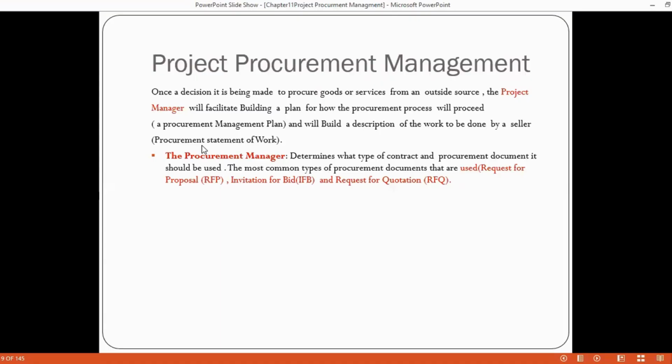The statement of work will be provided from the client side, saying what items he needs to purchase and what he needs us to do for him, and whether to customize an application for him, or he needs to directly purchase a ready-made product from our side. So there will be a plan of whether we're going to customize or take a ready-made application, which will require performing a gap analysis between the current environment of the buyer and the product we're offering, and we show the gap analysis between them and the benefits to be returned from services onto the product.